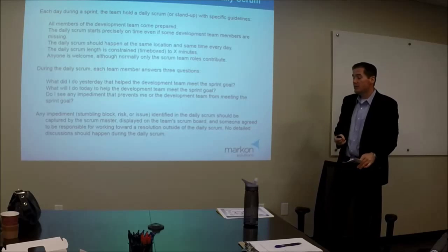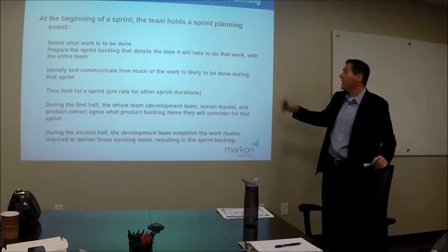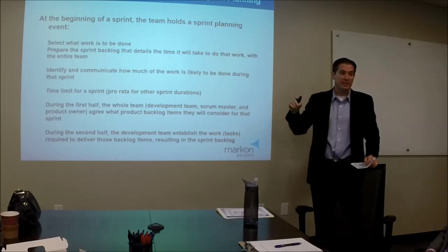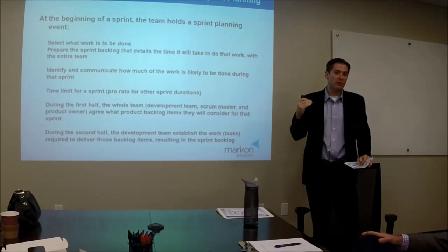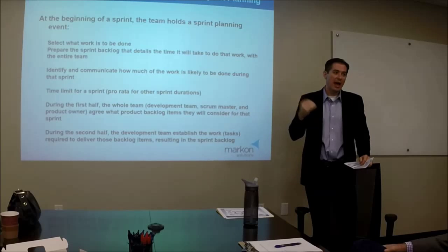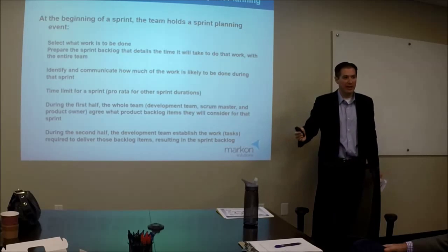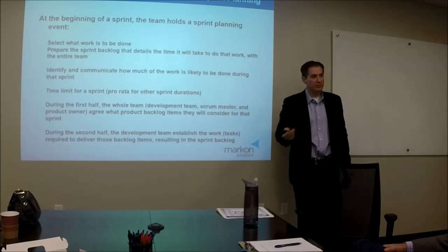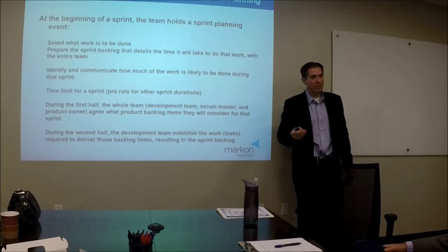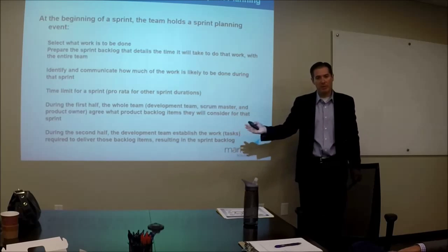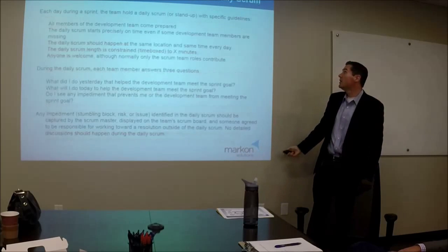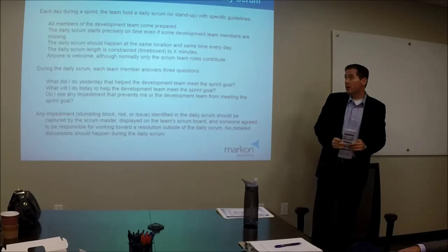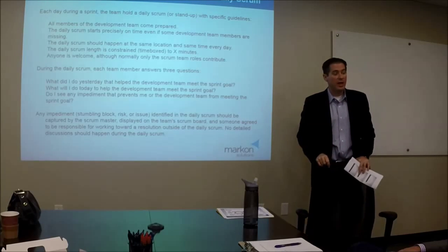The daily Scrum is, oh, by the way, the planning meeting, how long does this meeting last? That's a really good question. It should last an hour for every week of sprint. So how long do we need to plan? Well, if you have a 4-week sprint, you could plan up to 4 hours. If you have a 6-week sprint, it could be potentially up to a 6-hour meeting. The daily Scrum though, you should figure out how long it takes to go around the room,